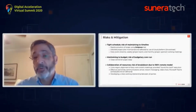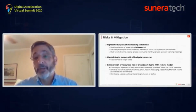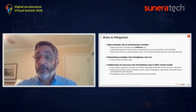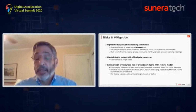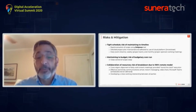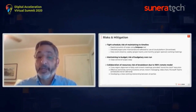First risk was that the client's schedule was very tight. There was only 4 months from the kickoff of the project until the go live date. So there was a very tight schedule to maintain for this upgrade. Now, Sunera, using its S4 Express tool, was able to quickly evaluate the scope and the requirements to execute that upgrade. And in the first couple of weeks, Sunera, with the client's team, was able to develop a very detailed project plan that was maintained in a cloud environment, a tool called Smartsheet. So no matter where the resources were located, they could easily access the project plan and be able to stick to the timeline.